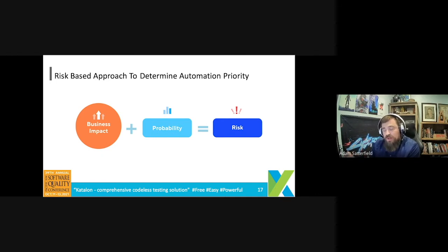be if we had to cut a week off of your testing cycle? Well, you could say, we wouldn't be able to get to these items, and several of them are high risk, so maybe we need to make some adjustments. Or you could say, I really don't recommend cutting a week off because we're going to miss out on these high risk items. So having that risk-based approach is very, very important to helping determine that priority, as well as to be able to answer that question of, when you get into that testing squeeze, what gets cut first?